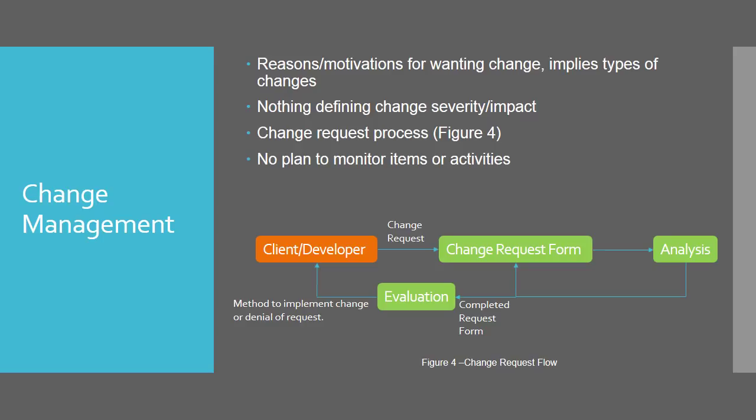Following this, the process for requesting and implementing a change is then described. The plan strictly specifies in detail who can make a change request, how the change is specified, how it is analyzed before possible implementation, and how the change is either approved or disapproved. While this plan does not include any definition on how the management of configuration items or activities is monitored, it correctly defines the process with which to resolve issues through the use of changes.